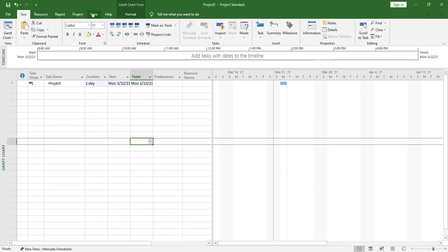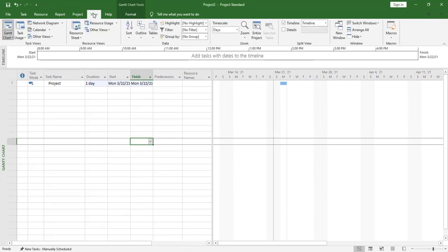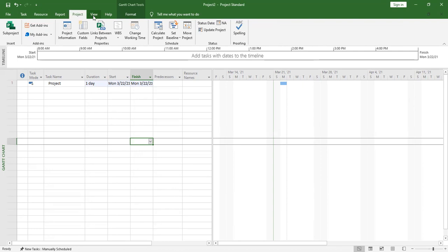Yes, and then fast tracking is a way that you carry out the tasks in parallel. Instead of waiting for this task to be done, you find that you can still do it while this one is not yet finished. Like linking A to B, you find that B can start in the middle of A without first waiting for it to complete. That's about relationships in tasks.